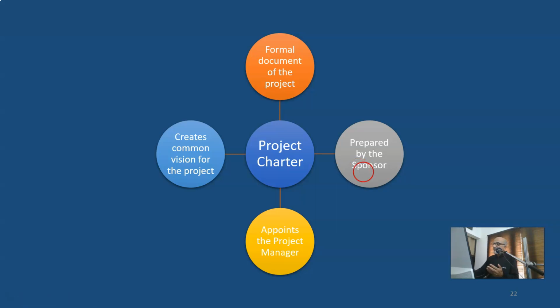And one of the sections in the charter is the project manager's name and the roles and responsibilities. So the project charter is the document which formally appoints a project manager to the project. Hence we say that a project charter gives authority to the project manager.